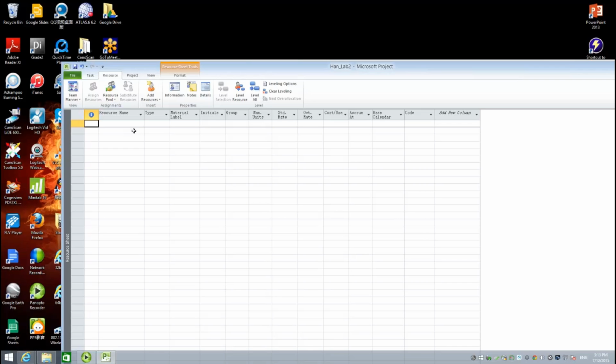Our first resource listed there is marketing staff. Marketing staff under resource name, then change max units to 500%. Then the standard rate, it's the hourly rate, $80 per hour. Next, R&D, maximum units, 500% and $80 per hour. By the way, 500% simply means 5 full-time employees.